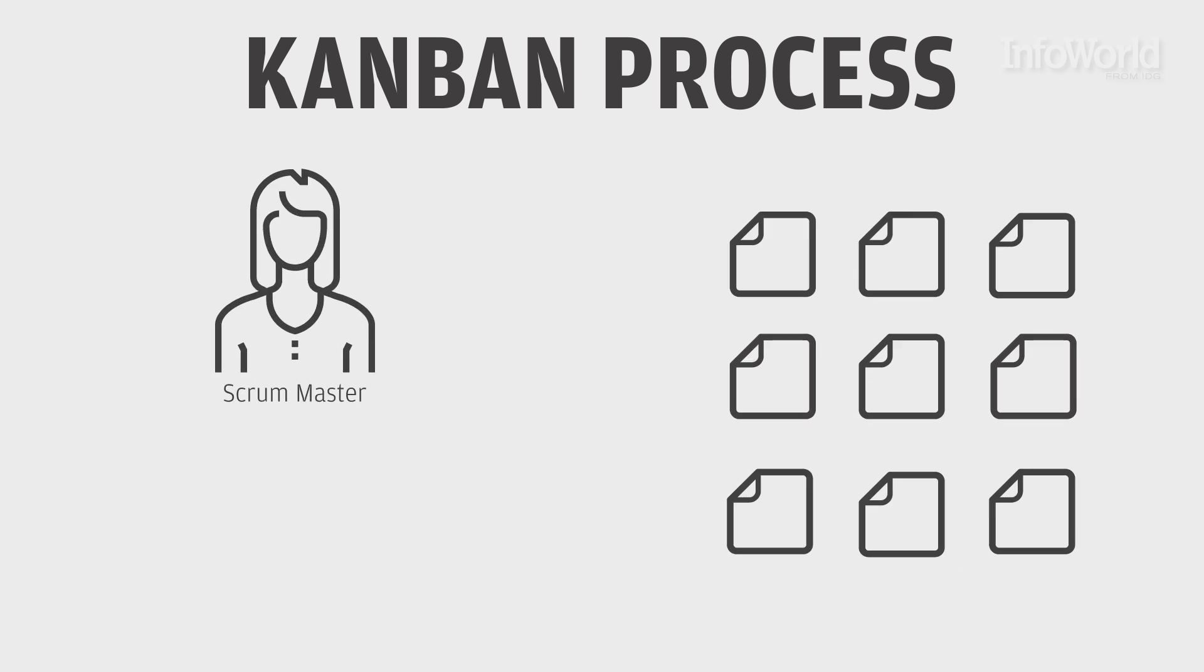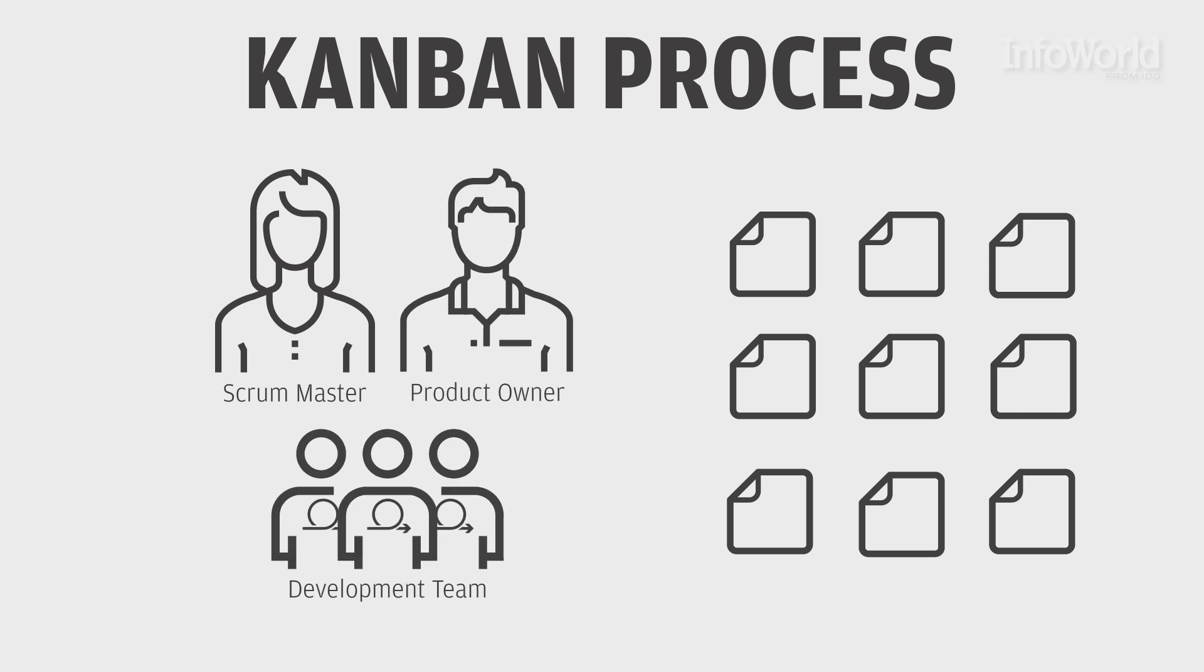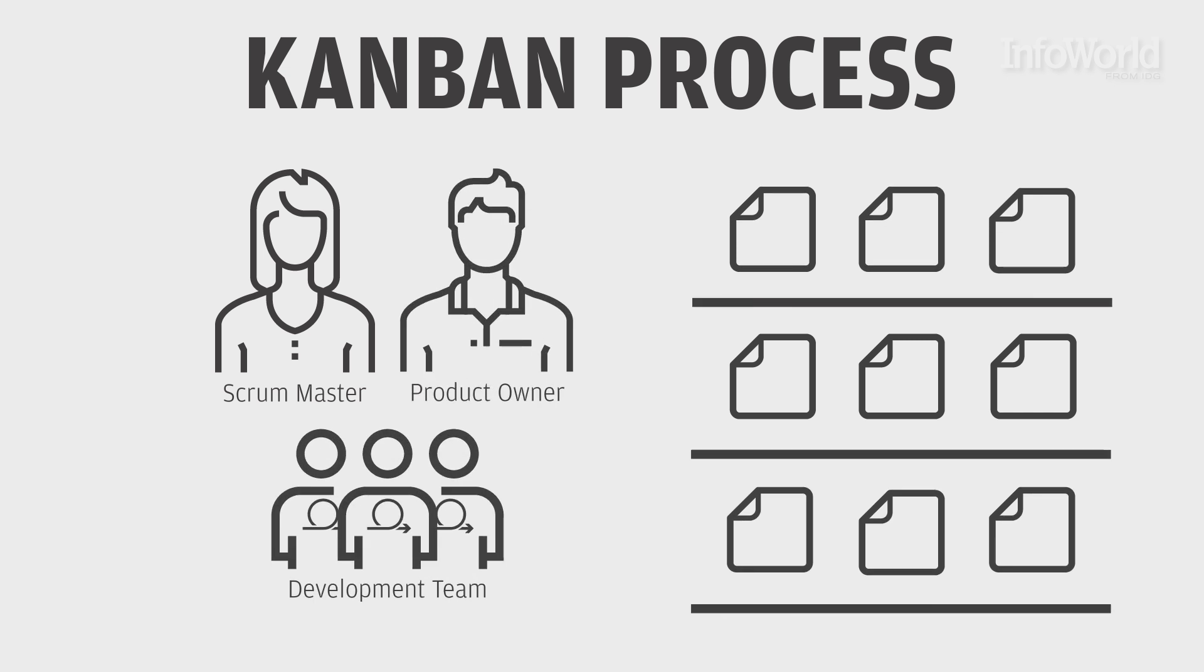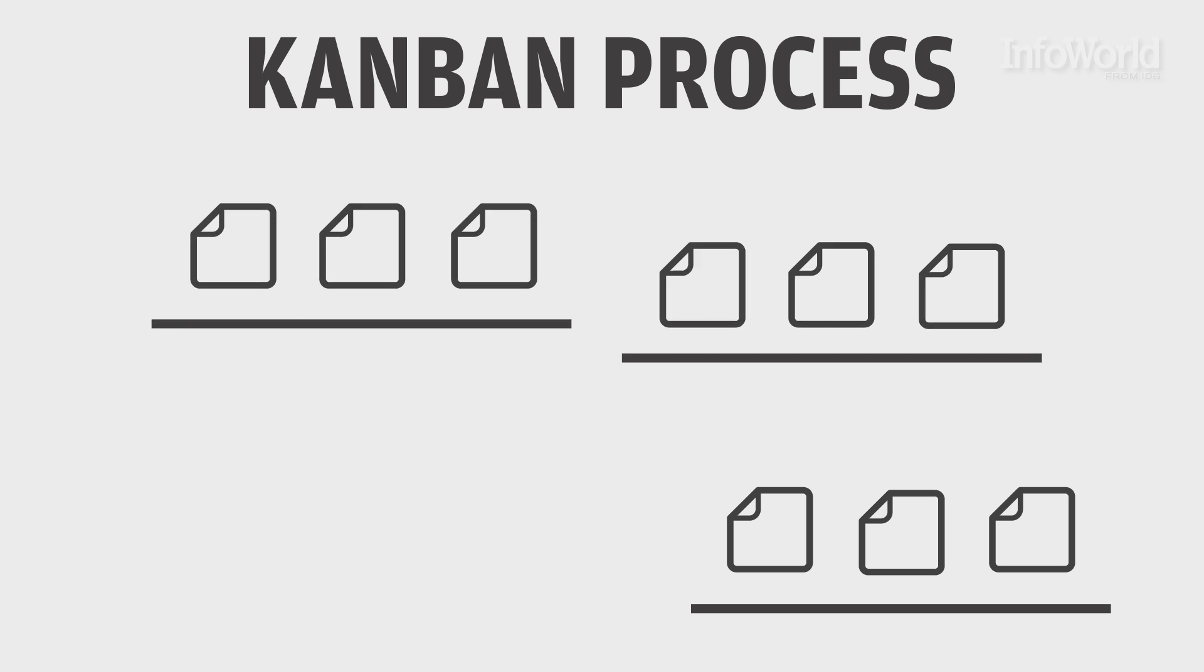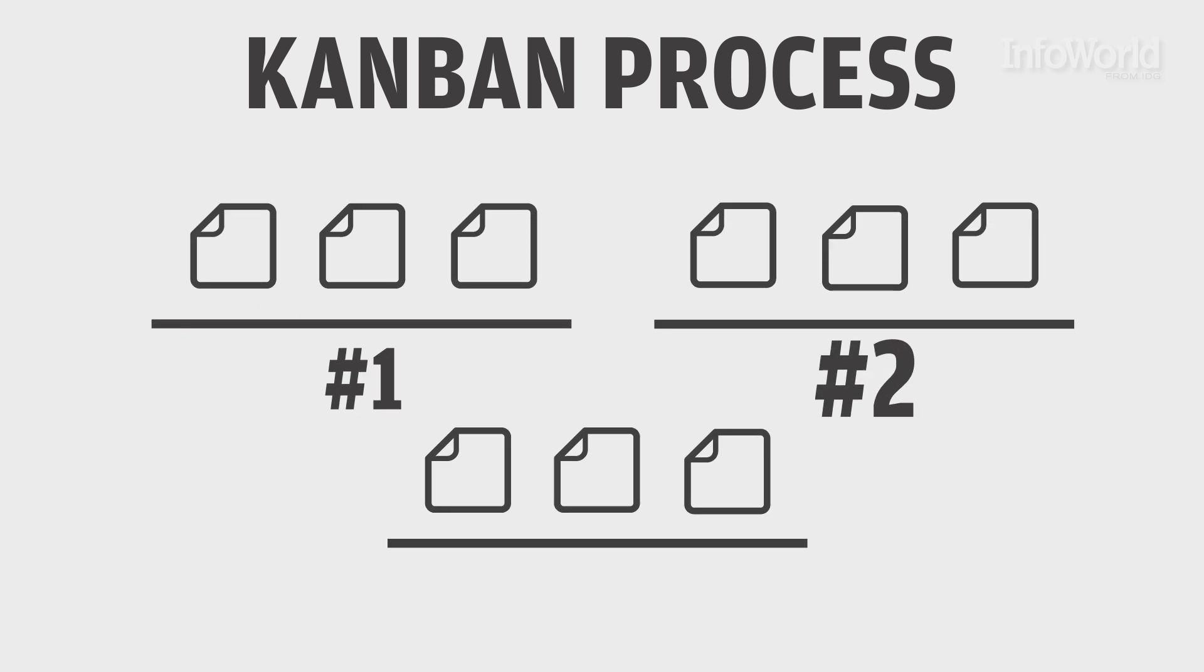The Scrum Master, in consultation with the product owner and development team, organizes the tickets into groups that can be tackled at once. The groups are then placed in order, so the first things that need to get done get done first, and so on.